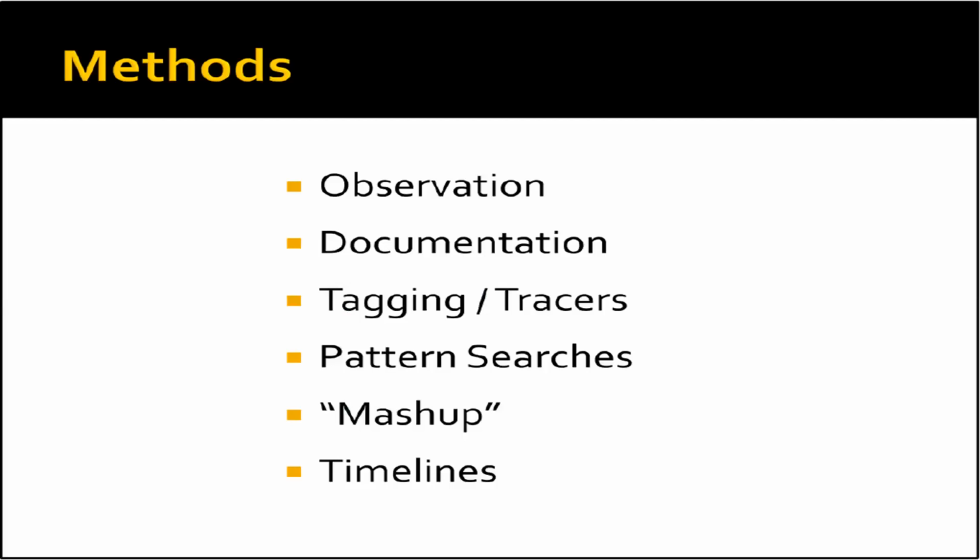You can use a mashup of multiple methods to determine the best method for tracking a project. Maybe you use observations to see if a particular group of providers or nurses is utilizing the new documentation methods. You can then use documentation to show improvements over time or tracers to follow records through the process. Pulling multiple methods together to provide an overall picture of the project implementation results is often referred to as a mashup, as you are mashing up different sources to create a picture.